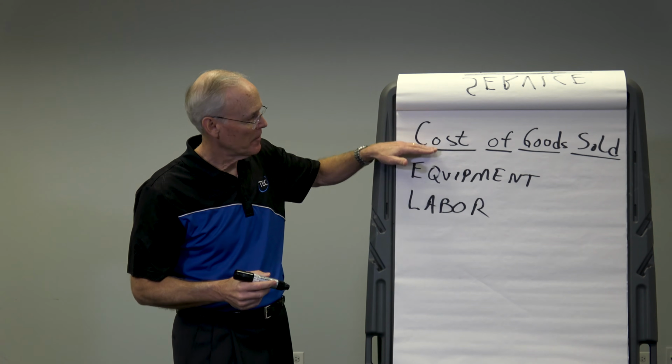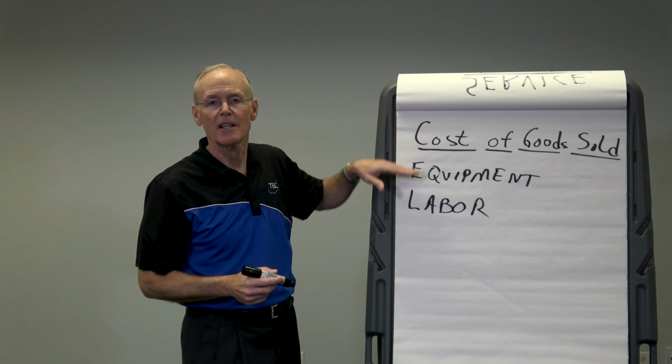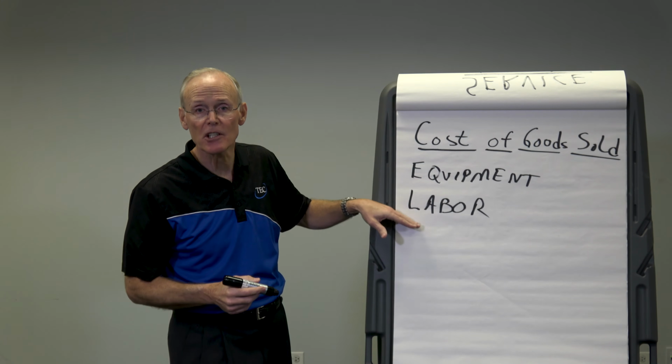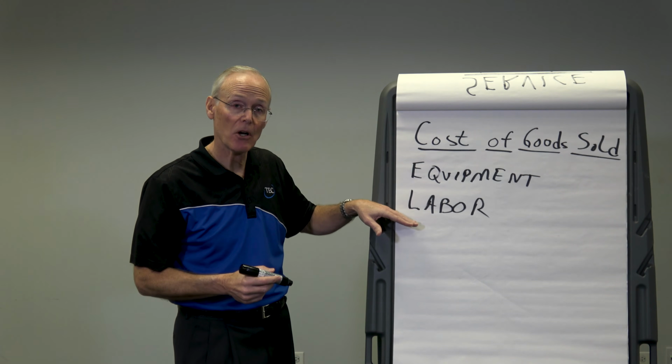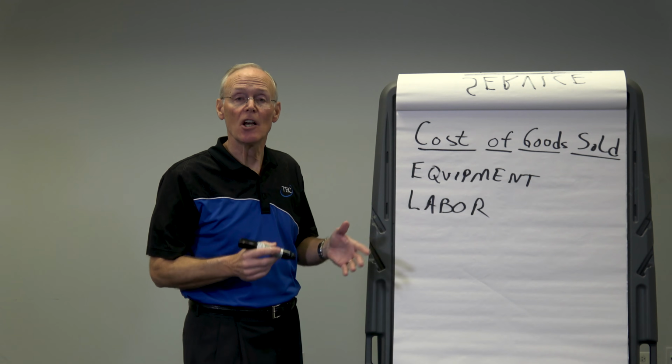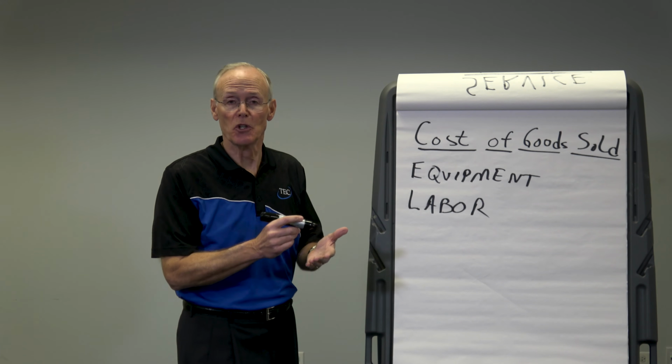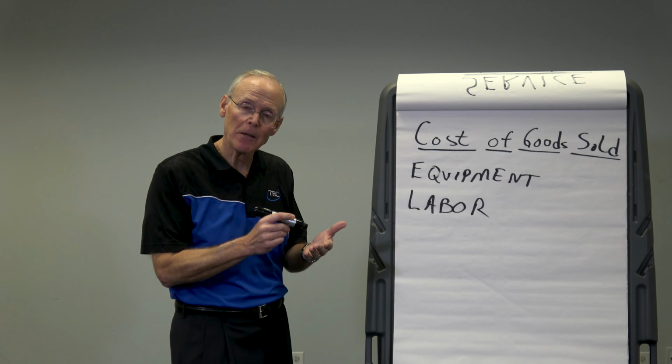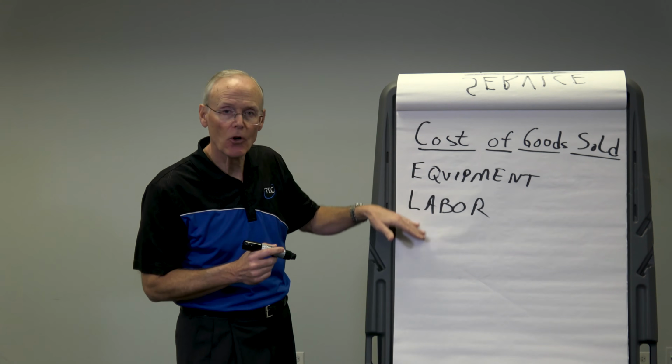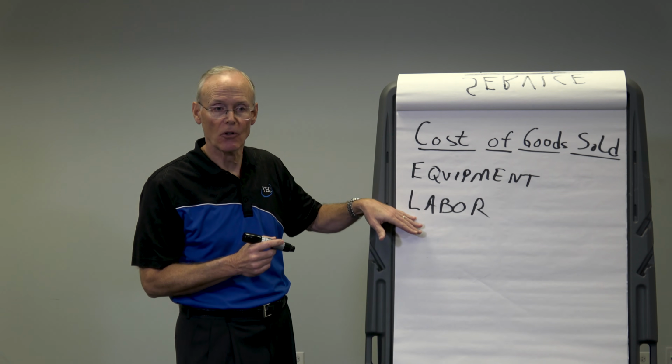Think of it this way. What's in cost of goods sold is there because you got the job and only because you got the job. Or another analogy might be what you put in your estimate. When you're going around and surveying the site, what items do you put down? Those are all the things that are a cost of goods sold.